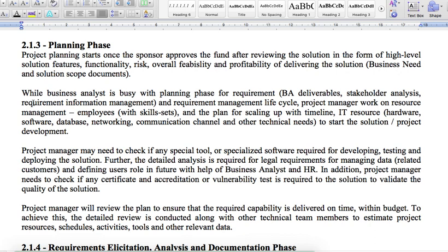Okay, and then we will also have requirement information management, what kind of information we will manage, and again we will also talk about the project governance: who are the stakeholders in the project, what will be their roles and responsibilities, and how decisions will be made within the particular project. That's your governance. Along with that, also how often we will meet, and what tools or particular way we will communicate, all of that is mentioned. And if there are any ongoing meetings, those are scheduled.